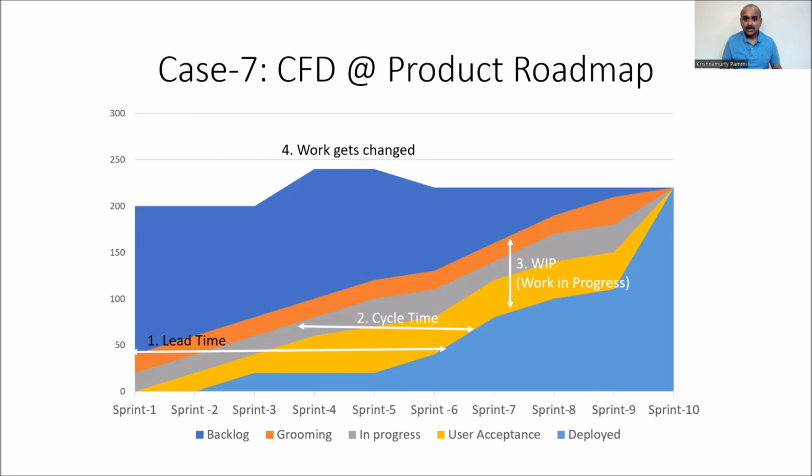They will derive, if this is how the flow goes, how long it will take. For example, if the product has not completed, out of 10 sprints, only 7 sprints work are done. Now they can actually predict, okay, so far 70% work is done, and to get another 30%, how many sprints I will take, also they will have their own perception. They can project, right?